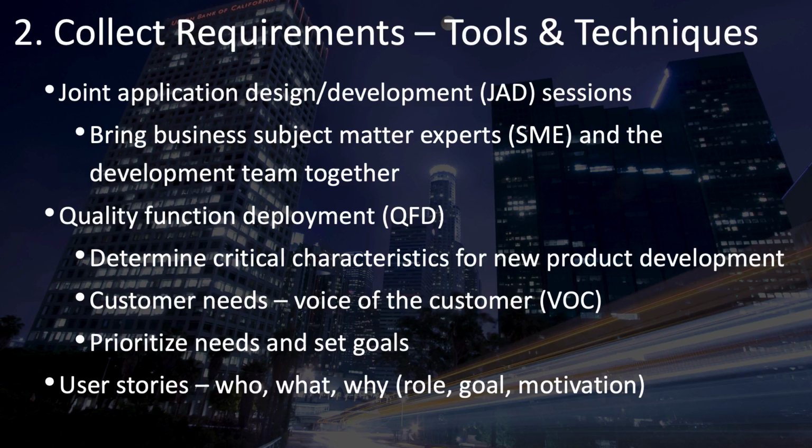If you ask why, and you find out that the way this timestamp is going to be used is to display all of the notes and changes in chronological order in a report that you give to the department head, and that's the only reason it's used, now you know the who and the why. This is for the department head, and it's so that they can see all of this in chronological order. Now, if that's it, that's a very different requirement than this next one.